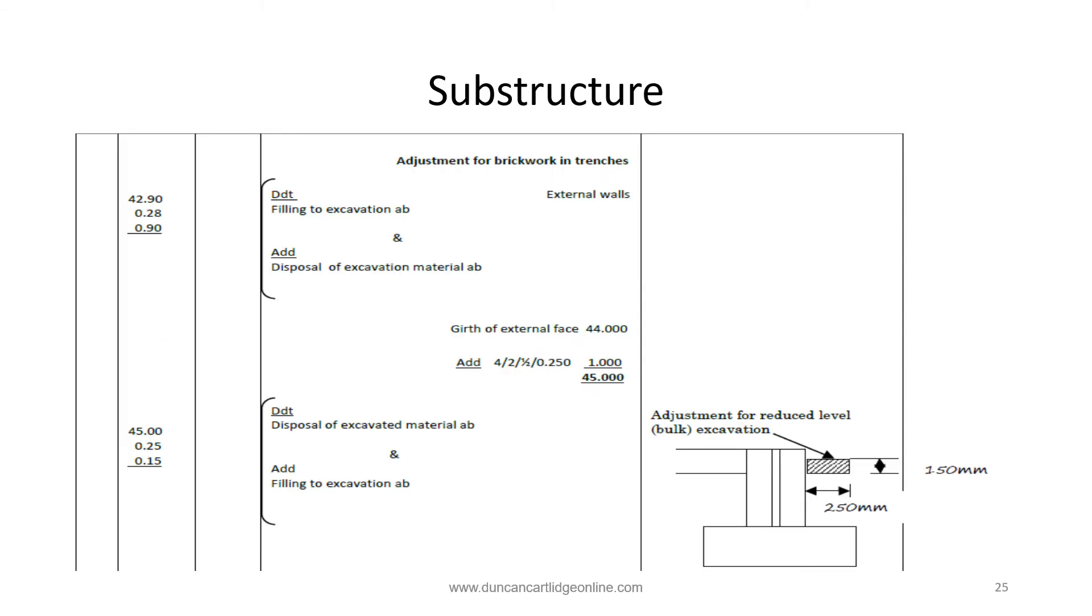We must now make some adjustments to the backfill and removal of spoil. The first item is an adjustment for the masonry in the trench to the filling measured on page 15. In addition, a strip of reduced level excavation measured on page 14 must be reinstated. To do this, the centre line of the strip has to be calculated as shown here. Starting with the girth of the external face 44 meters, add 4 times, twice times, half times, 250 millimeters to arrive at the mean girth.